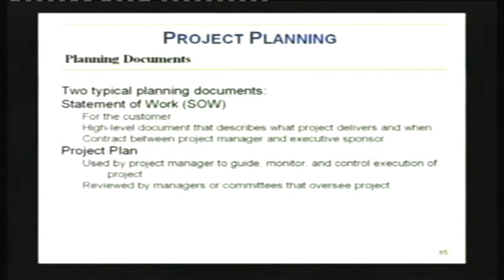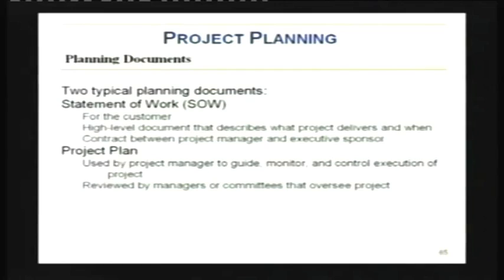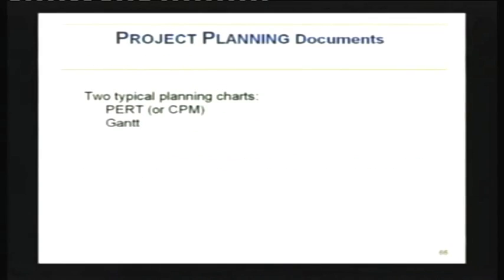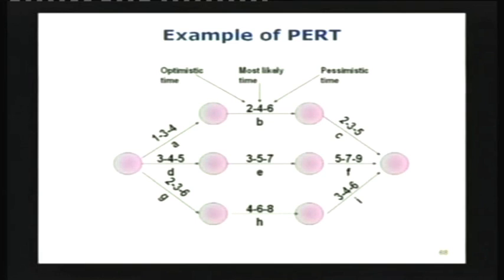Deterministic. Very good. Number one. The other has to start with R. Resource. There's no resource constraint in CPM. That's something we assume. Only then can we go ahead and do our CPM, because if you bring in constraints of resource, that becomes a pretty complicated problem. We'll take a look at that later on. We'll see how we utilize the information on resource availability. Let's now take a look at this technique called PERT.